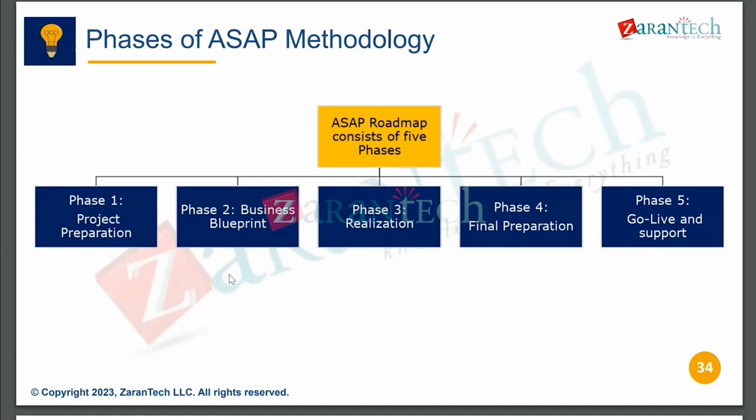So we need to maintain some custom tables. We have to upload the master data. From the purchasing side, we have to upload the initial inventories, like stocks, whatever is available in the plant. That inventory stock will be maintained over here. Some of the FI activities. So these kinds of things, master data, everything, will be uploaded in the technical go live phase.